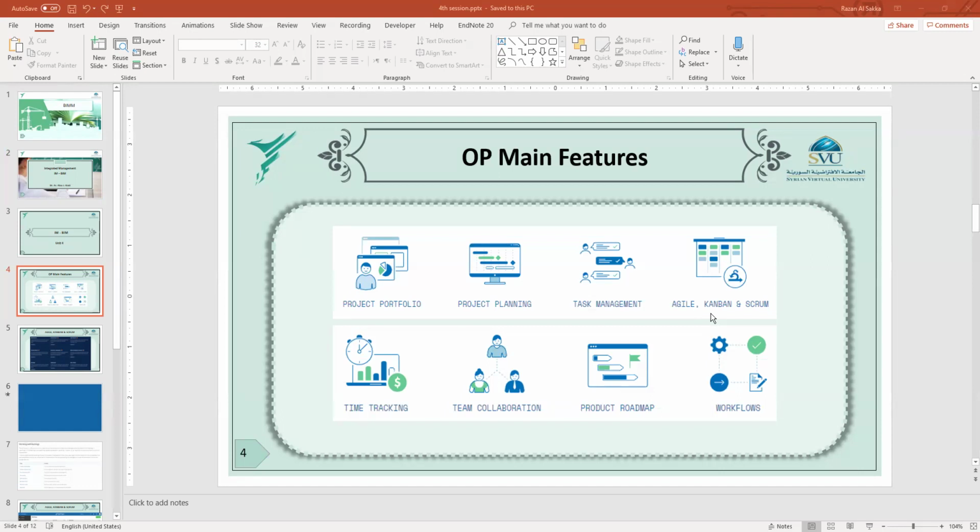So you have to break down your project into very small pieces of work, and each piece of work can be done by a single person or a single team. Then this work package is going to transform from the start of the work, the processing of the work, validating the work, and finally accepting, finalizing, and delivering the piece of work.